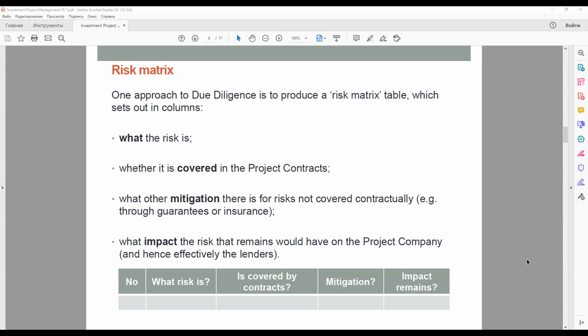So far as they are not listed in the project agreement with any of these categories, risks will lie with the project company. However, the project company may transfer this risk to a subcontractor by dealing with the effect in the relevant subcontract. So, for example, a risk which is not covered by a project agreement, such as late project completion, may give rise to a claim against the construction contractor. That is, the construction contractor will have to compensate the project company should the risk crystallize. In some cases, risk may be taken on by sponsors.